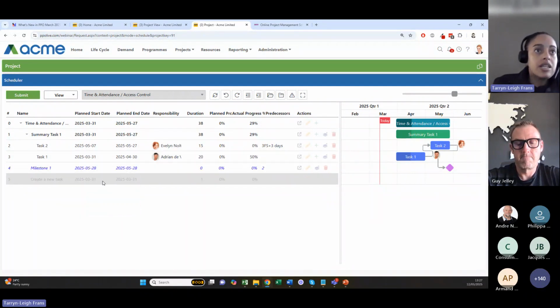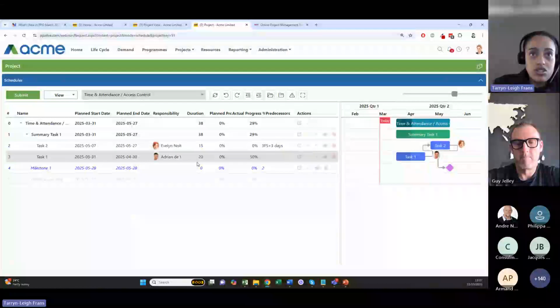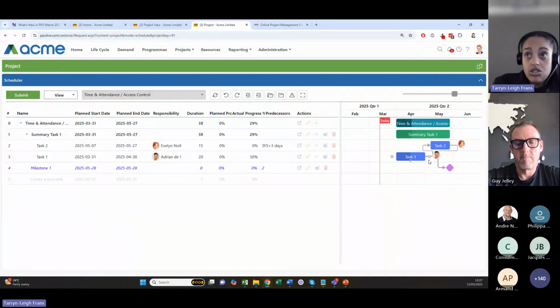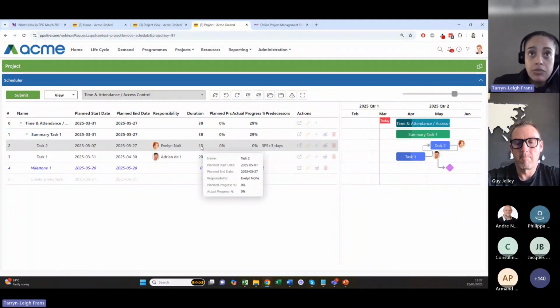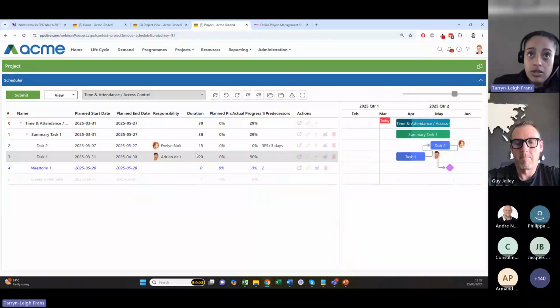To recap, the ability to set durations of tasks. You can change durations or set the durations. You can either make use of an input field on the duration column. Alternatively, you can just drag the task along, and if you pulled the end date, that would adjust the task for you.